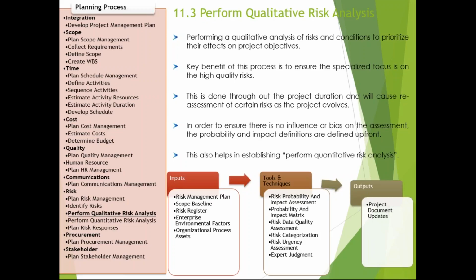No, we cannot. It might happen that theft only happens in one particular place, and it's not that we would be losing $10,000, $20,000. It's not like that, right? What is the probability? Probability is probably low or very low, depending upon the kind of measures that your society has taken. And if it happens, impact is going to be either medium or high, right? Depending upon what you have at that point of time in the house, it's not that you always keep jewelry in the house. Sometimes it might be in the bank. It might be at your house if you plan to go for an event or something. So depending upon that, you cannot really assign a specific number to it.